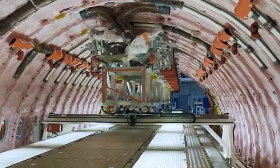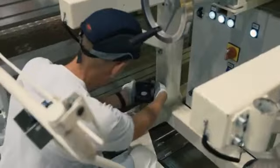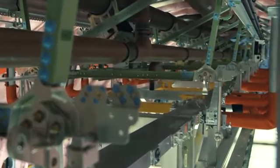So specific for A350 is that we have the so-called modules underneath the upper shell. Modules is an assembly of frames which we equip then with all the systems inside, so mechanical systems like air conditioning pipes and electrical harnesses. We do that outside the section to have, during the ramp up, an opportunity to move the production line faster. So we have decoupled a big work package from the speed of the production line, and another advantage is that we have very good ergonomic working places where we don't have to work overhead, but we can sit or stay in front of the product.